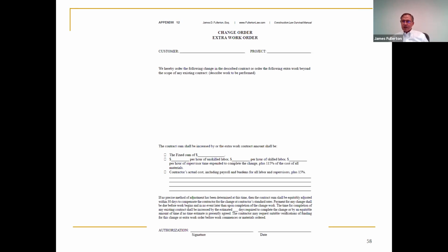I need a copy of the general contract. The subcontract you sent me requires me to comply with the general contract. I can't do that if I don't know what the general contract says. I would literally say this in the email that you send to them. And I think every judge on the planet, if a year later a GC is trying to hold you to the terms of a general contract based on a conduit clause, and you could show where you pleaded with the GC for a copy so that you could comply and you never got it, no judge is going to enforce that.